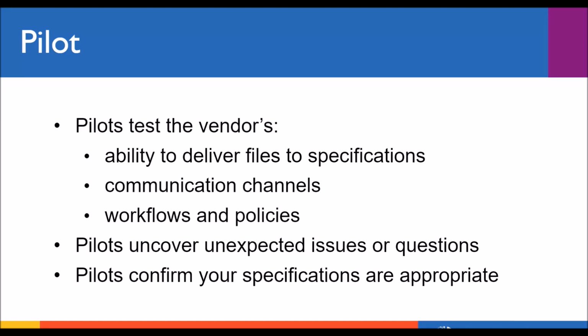For example, if you're considering using a losslessly compressed preservation file format, request samples to test within your own system before making a final decision. This way, you can ensure that what you request is something that you can actually use. You can also use the opportunity to make changes to the project's deliverables and scope if you determine that what you asked for isn't what you actually need. Repeat the pilot if there are significant changes to deliverables or scope. You can repeat the pilot as many times as necessary to get it right.